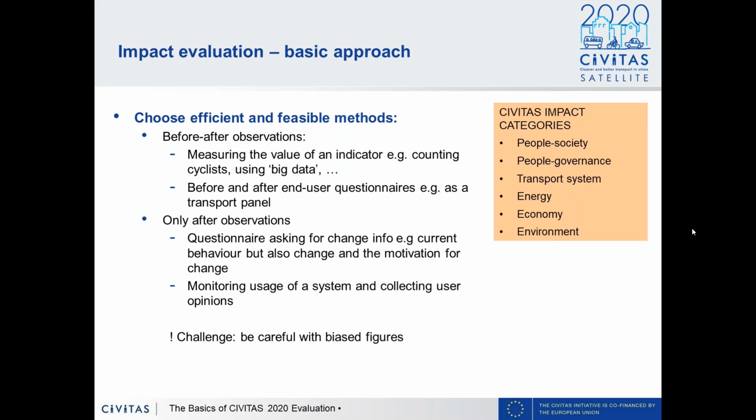They made an evaluation where the assessment of the indicators was really linked to weighting factors, which were different for the different stakeholders. In this way, from an evaluation point of view, we can also make the evaluation of the measure more transparent. I think that's really in line with what you mean. Okay, thank you. Yeah, please.